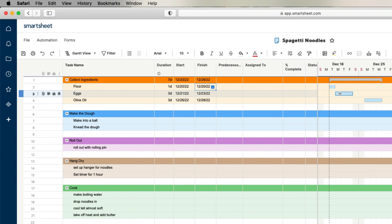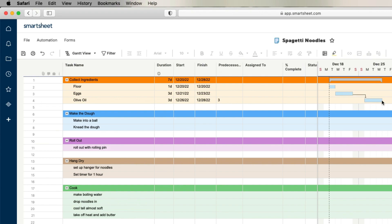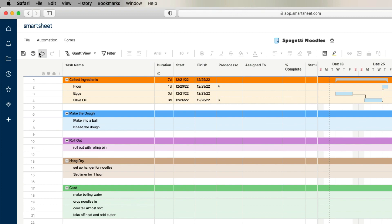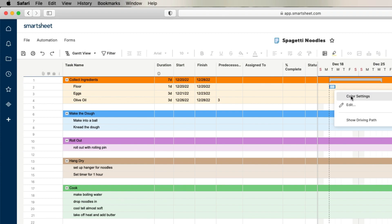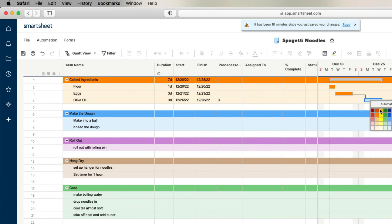These bars are interactive — you can move your cursor to the right to extend them using the arrows. I'll click and drag it all the way out. When you do that, it automatically does the math, adds the days, changes the date, and updates the summary. If you click and drag in the corner, you can move the predecessor to the next task. And if you want to change the colors, just click into the bar, right-click, go to color settings, choose your color, and click save.